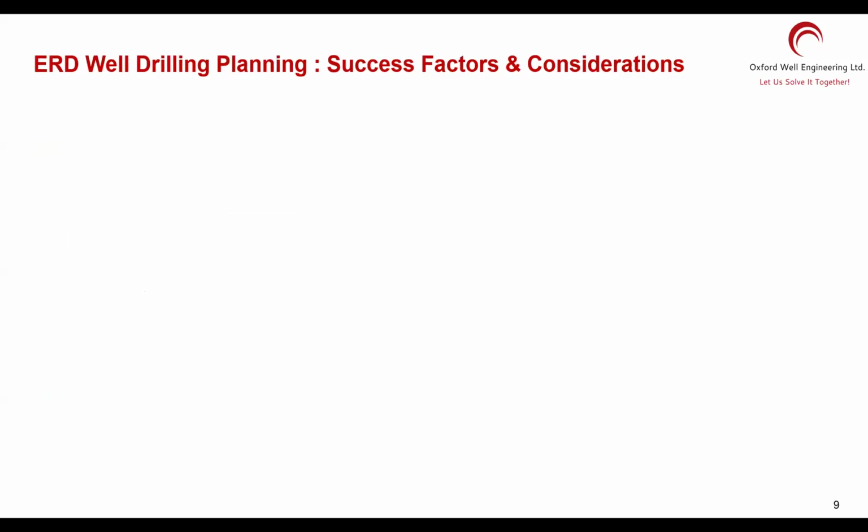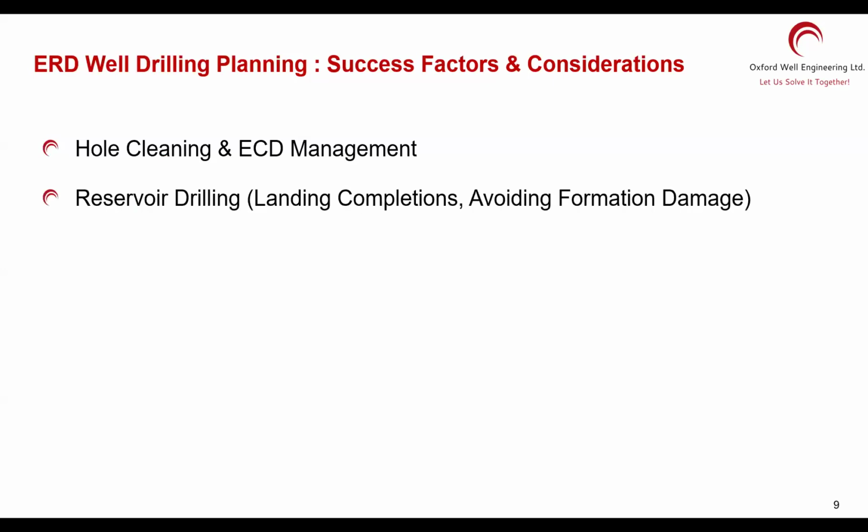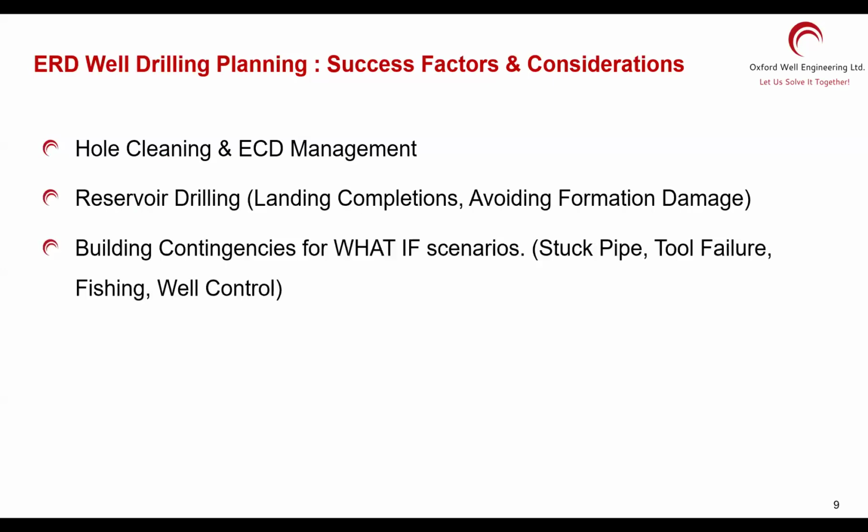Okay, so success factors and considerations: hole cleaning. You take care of hole cleaning, you place the well right. What if you cannot build? If you're having difficulty building, what are you going to do? Do you have any contingency scenario? Do you have another target you can land to? If you get stuck, what are you going to do? Do you have any fishing planning? How would you fish out? Well control. It's a long list of risks that you need to identify before you drill. If you don't identify them and it comes to reality, it's going to cost you huge problems.